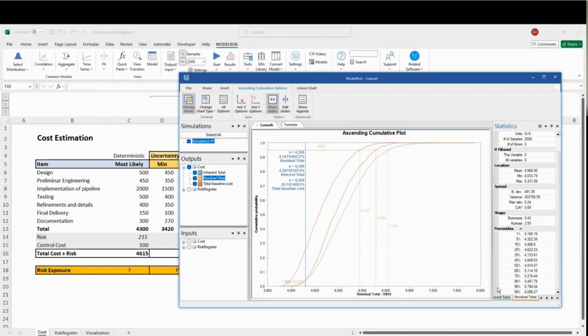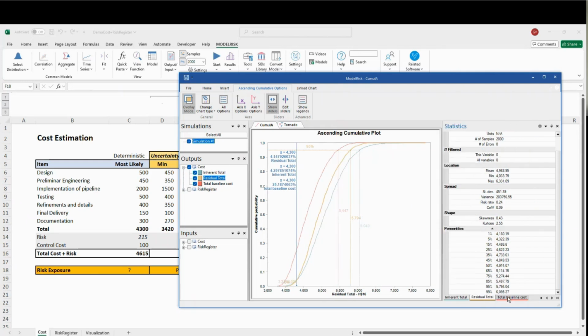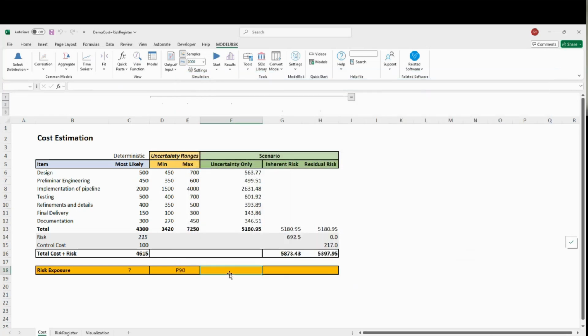And I can see that in every one of them, you have all these different tabs where you can see the percentiles, or you can build your own reporting. And this is what I wanted to show you. For example, you can say equal Guz sim percentile, and it says from this distribution, I want my 90%.